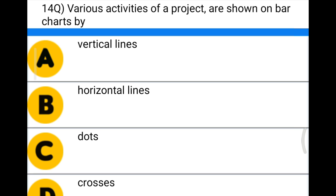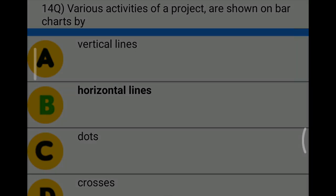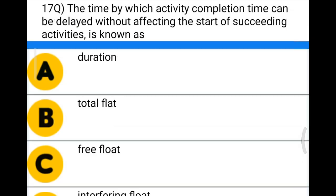Next question: various activities of the project are shown on a bar chart by — Option A: vertical lines, Option B: horizontal lines, Option C: dots, Option D: crosses. The correct answer is Option B, horizontal lines.